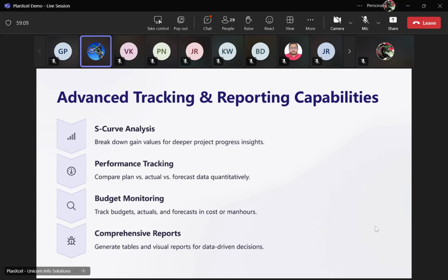So what happens because of that is, when you have the quantities running and you're not performing well, the quantities which have to be completed in the balance durations go up. That is made clear in this particular feature here, where the forecasts are calculated, so you automatically see how you have performed in the past and how you have to perform in order to meet those needs. This makes it easier for us to understand what the remaining duration should be in reality